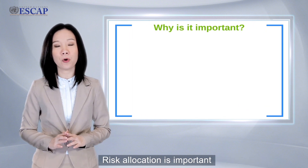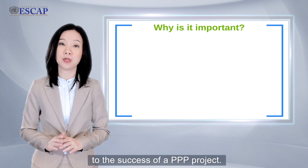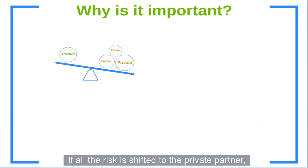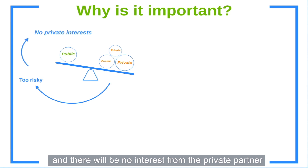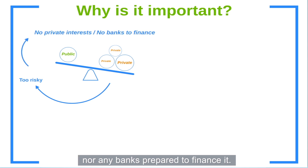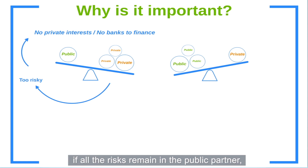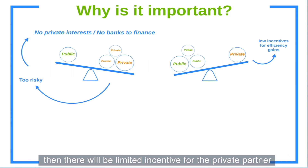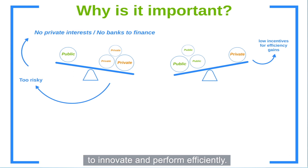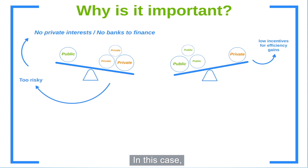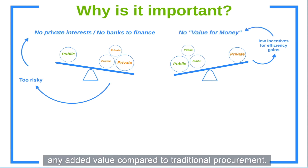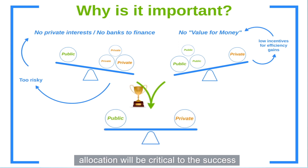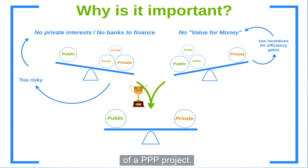Risk allocation is important because it is a critical factor in the success of a PPP project. If all the risk is shifted to the private partner, the project will be deemed too risky and there will be no interest from the private partner, nor any banks prepared to finance it. On the other hand, if all the risks remain with the public partner, there will be limited incentive for the private partner to innovate and perform efficiently. In this case, using the PPP mechanism might not offer any added value compared to traditional procurement, so finding the right balance of risk allocation will be critical to the success of a PPP project.